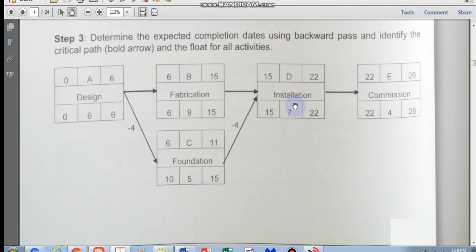Okay, so here you can put four. There's 4 days here for foundation, meaning that I can take away my four guys. I mean, I can take away 3 or 4 persons from my foundation work and borrow them to another activity, for example, in another project. Or, like I say, this can be just one particular activity. You can actually send these 3 guys to do concreting for drainage work.